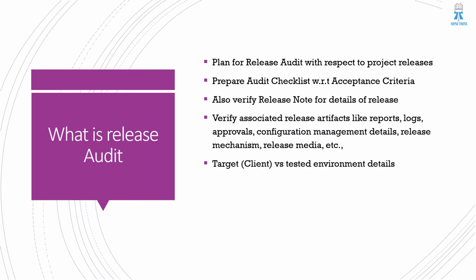So what is release audit? It is the audit which we conduct before releasing to the customer or before releasing to the next phase of development. There are two different kinds of release audits. One is the internal release audit. For example, a development team is releasing the code to the testing team. That's when we need to conduct an internal release audit.